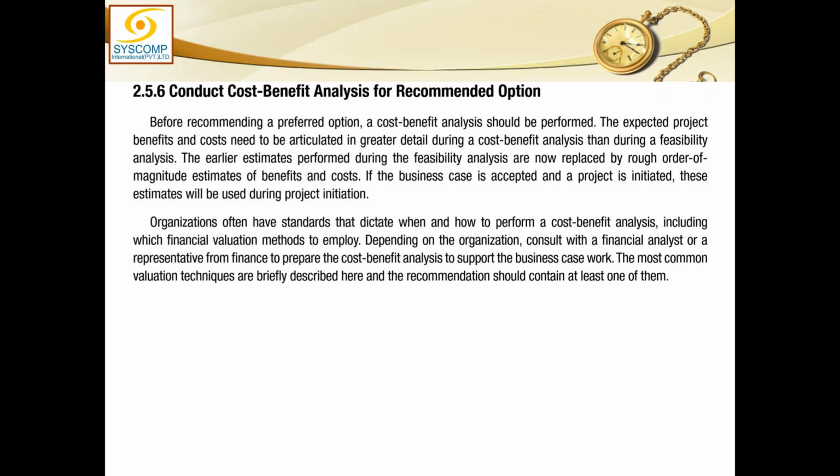The earlier estimates performed during the feasibility analysis are now replaced by a rough order of magnitude estimate of benefits and costs. So this is a better estimate than the feasibility analysis, because feasibility analysis was too sketchy. But still, even the rough order of magnitude is not a very detailed estimate. This is an approximation. If the business case is accepted and a project is initiated, these estimates will be used during the project initiation.